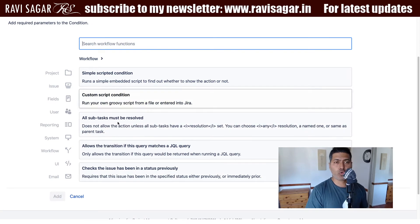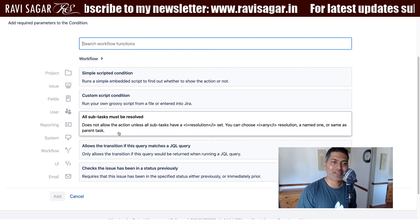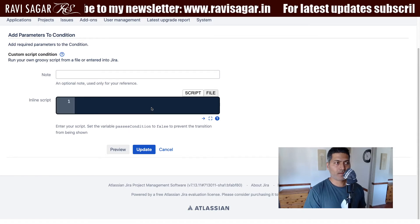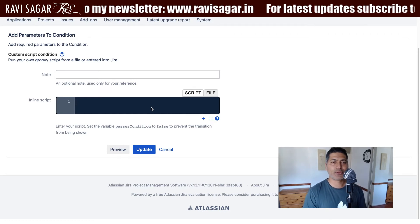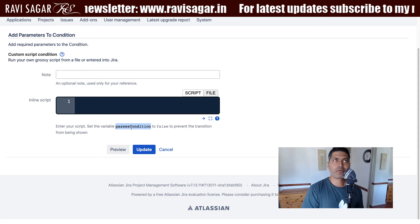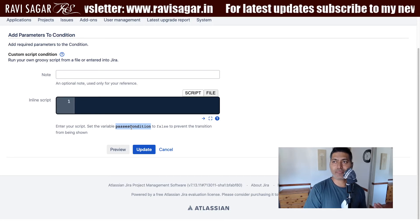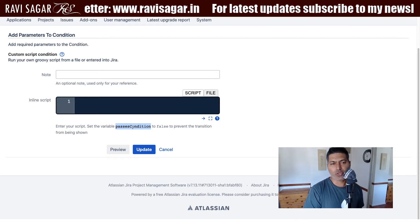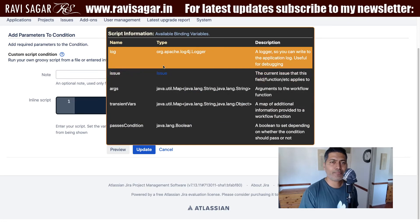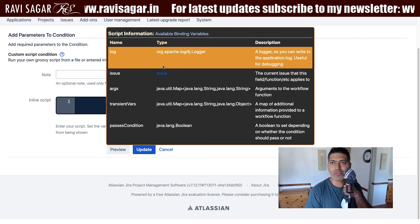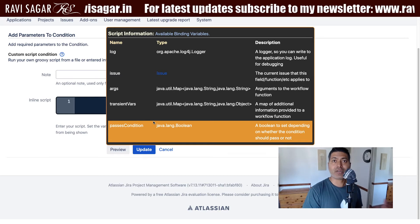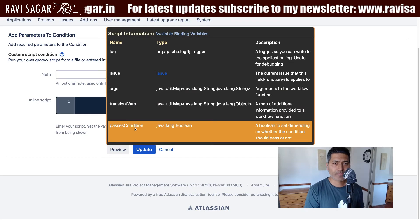You do have some ready-made workflow conditions, but I want to use something like a custom script condition. When you add a custom script condition, you can write your script here and make sure your script has a variable called `passesCondition`. If this variable is true, only then the transition can appear; if it is false, it won't appear. If you click on the question mark, you can see all the binding variables that you can use — they are already there for you, so you don't have to declare them.